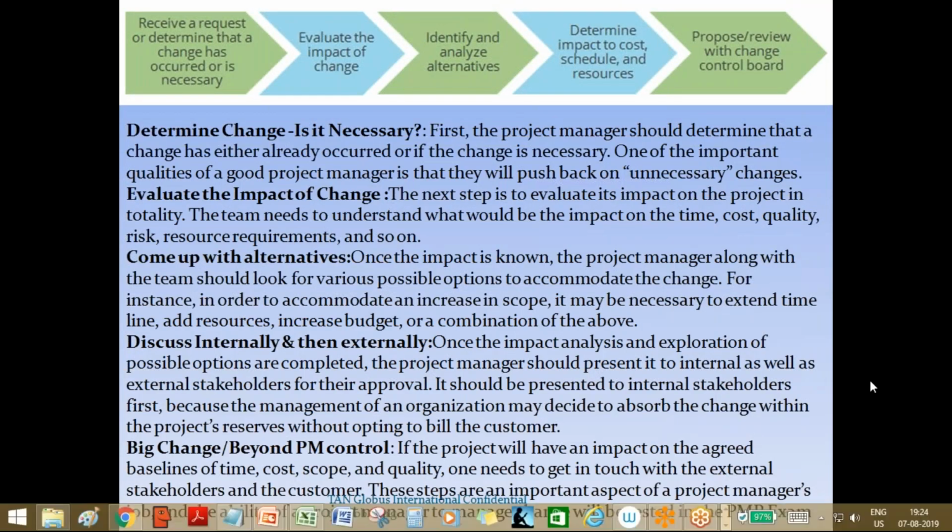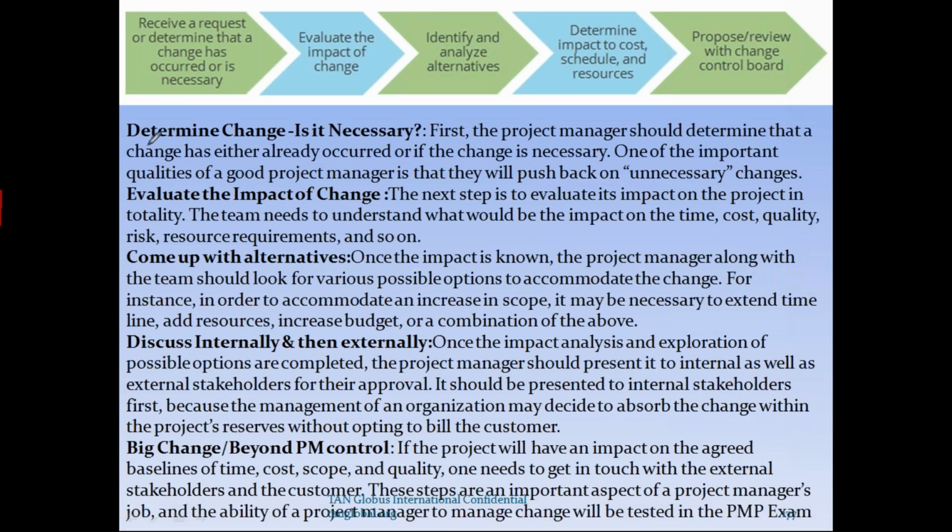So what is the first step? Whenever change management happens in any process, where can the change happen? In executing processes, in monitoring and controlling processes, maybe in planning processes also. Plan procurement also can have an output of a change request. You cannot say only a schedule change is a change. Change can be anything. A person resigns and you have not planned for it, then you have to raise a change request. All the people have gone on unplanned leave, a bigger impact to the project, change request. The vendor has delayed the delivery, change request.